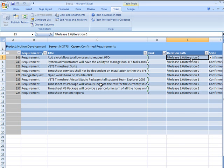Once details about the requirement and its subsequent requirements have been captured and confirmed estimates have been added, the customer is empowered to rank that requirement relative to the other requirements in the system. Based on this customer prioritization, development iterations are planned and a project schedule is maintained.